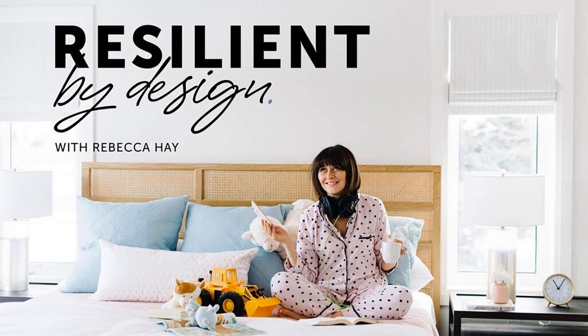starting out. And so as a result, charging hourly, I would hesitate to go knowing that I don't want the clients to think I'm abusing their money and my time. So charging a flat fee helped with that. The other way it's really helped in that implementation phase is that because we collect a 75% deposit on our fee, and all the goods that we're purchasing for them, we're not continually asking them for money.